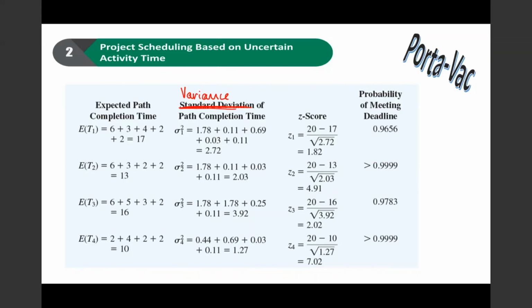However, a probability estimate based only on the critical activities can be overly optimistic. Because we are dealing with uncertain activity times, longer than expected completion times for the non-critical activities could actually cause the whole thing to go haywire. So it will be good practice to find out the probability for all the different paths.